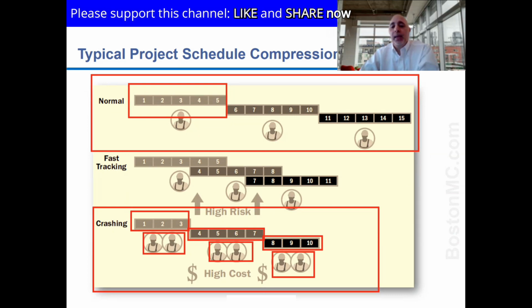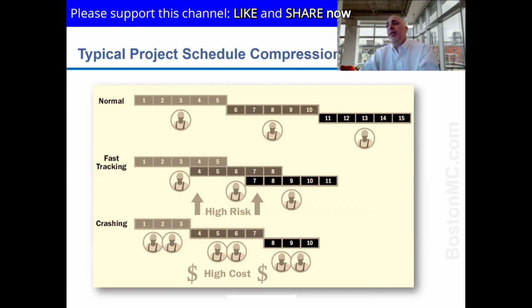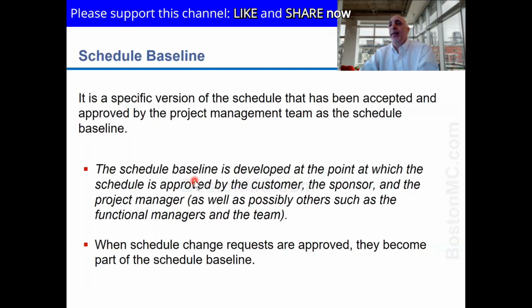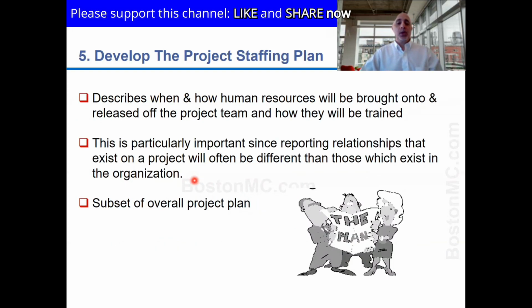5 more man days. It depends if I want to spend the money, and I can choose to not do crashing because it's too expensive for me. And I could decide that, let's wait 15 days. We'll sit on it. So these are compression techniques that you should be familiar with. You as a PM, you have to make decisions, right? And then in the end, you'll have maybe a more optimal schedule that your boss will be happy with, and that's called your schedule baseline. That is if they approve it, okay? Once they sign off and say, okay, I'm okay with the timeline on this project, then that becomes your project schedule.